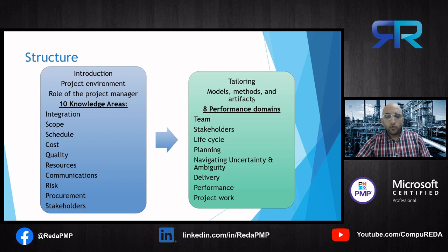They are outcomes focused. Note that outcomes are different from outputs. As you're likely aware, in previous editions of the PMBOK guide, the processes culminated in an output, such as a scope statement, risk management plan, stakeholder register, and so on. Outputs are fine, but they are not the same as outcomes. Outputs enable outcomes. For example, if we have a performance domain around effective interaction with the stakeholders, I would want to know the outcomes associated with that. For example, one outcome might be satisfied stakeholders. I can measure that by observing relationships, interactions, and so on.